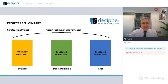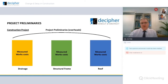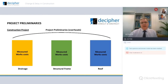If we break into the next layer and look at a construction project, again the construction project has elements of cost. This is a very simple building — it's got drainage, a structural frame and a roof. It has measured works costs for each element; those are the direct costs of executing those elements. But above it, it has its overheads or project preliminaries — the indirect costs that can't be attributed to a particular element, absorbed by the various elements in the project.